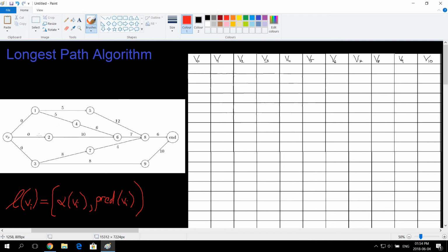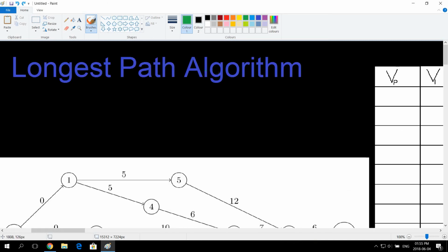So let's just start. So we are at this point. This is our source. This is the vertex we actually created. If they give you a graph and you see there's like numbers and stuff, then you need to add a source. So add a source, call it VP, and then add to all the other starting vertices that they gave you, draw edges to them and give them a label of naught. Okay, so because it's our starting vertex, it's gonna write in green.